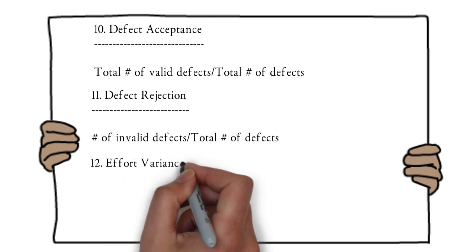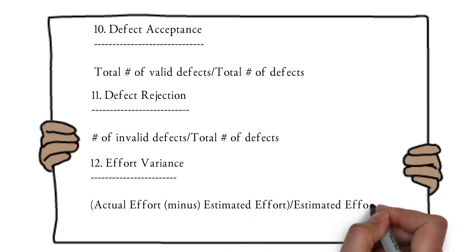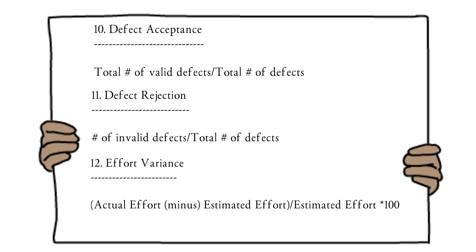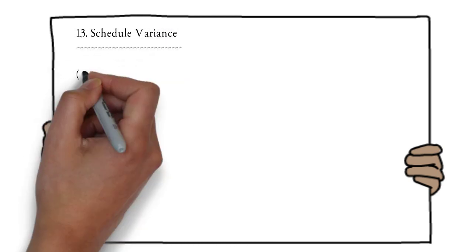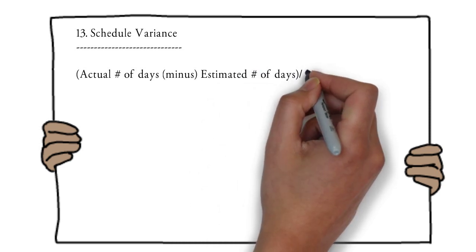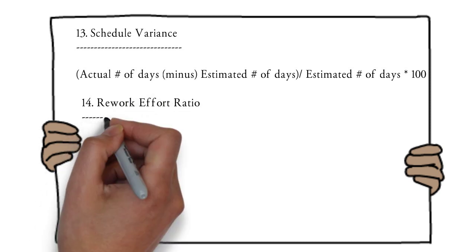During project planning we estimate effort required to complete the project, but actual effort may vary. Effort variance = ((actual effort − estimated effort) / estimated effort) × 100. Similarly, schedule variance = ((actual number of days − estimated number of days) / estimated number of days) × 100. These give the percentage variance in effort and schedule respectively.